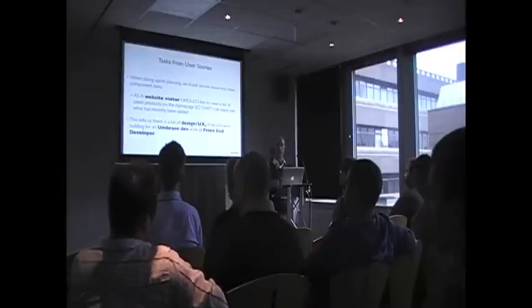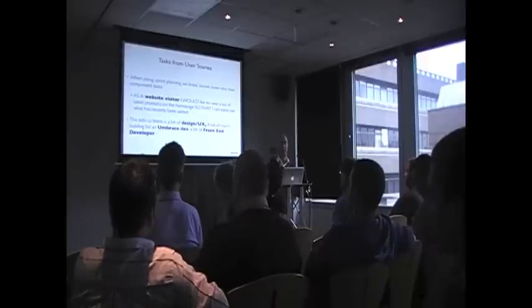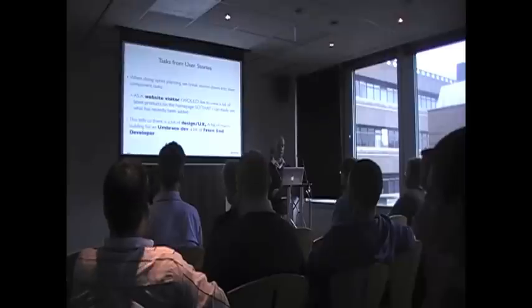So we break down user stories into component parts really. For instance, this one: as a website visitor, I would like to view a list of products on the home page so I can easily see what's recently been added. And as I said before, there's a bit of UX there because you need to design the panel. There's a bit of front-end development because you need to build the HTML. There's a bit of macro building to pull out the products. So there's a selection of skills. But what that does is it allows you to plan for the next week, and you know what resources you need for all those pieces. So it makes things easier to plan going forward.